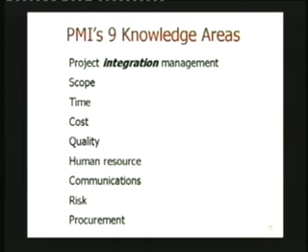Give me your name. Robin, sir. What Robin is saying actually comes under what we call change management. You cannot have a project going and arbitrarily make changes in it. You just cannot do that. I remember when I was a plant production planner, for example, a production scheduler, many times the salespeople used to call the machine shop directly. They would say, where is my job? Tell me exactly when my job is going to be done. And they'd be talking to the machinist directly. This would be such a big disruption because management would not be aware of it, and changes were being made right on the shop floor without any kind of change control in place. So what Robin is saying is very, very critical.